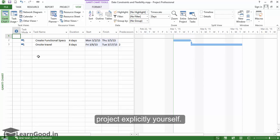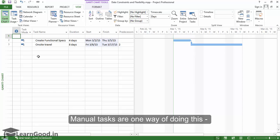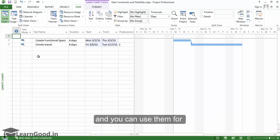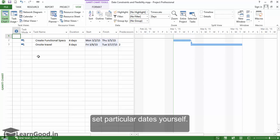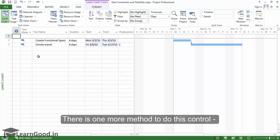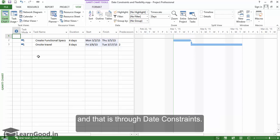Manual tasks are one way of doing this, and you can use them for some situations and set particular dates yourself. There is one more method to do this control, and that is through date constraints.